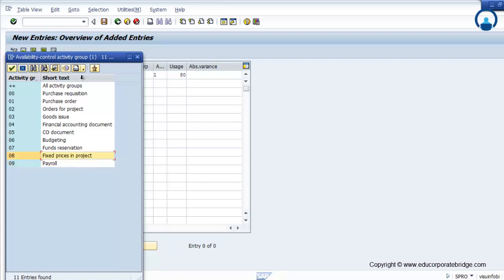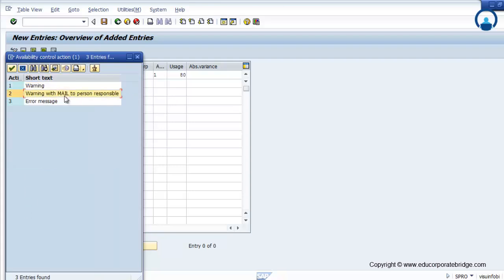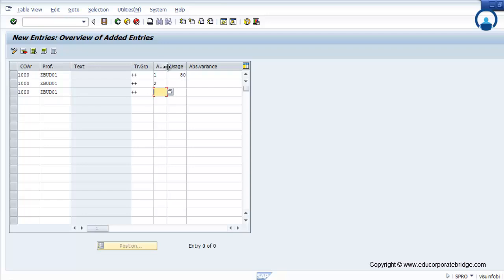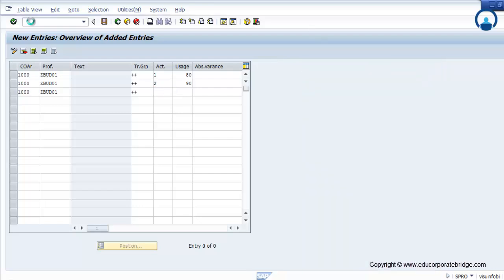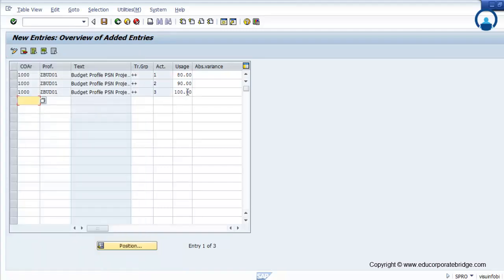Fixed pricing project — these are the different options. If you see the plus-plus sign, this is applicable for all. The second activation is on mail — a mail will be sent to the person responsible. Initially, one person responsible is maintained; whoever is allocated on that particular WBS as person responsible will automatically receive a mail that the WBS budget is almost 90% exhausted, so you have to do an add-on budget. The third is the error message, which directly gives you an error.